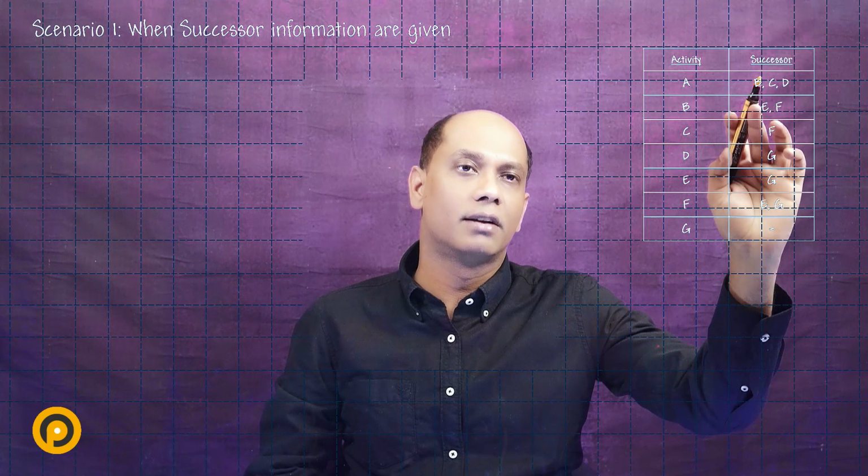So if you see carefully, we have A, B, C, D, E, F and G. However, A is missing. So what is the meaning of it? A is the first activity. So let's write down A as the first activity. Now what is the last activity? The last activity will be the activity which will not have any successor.